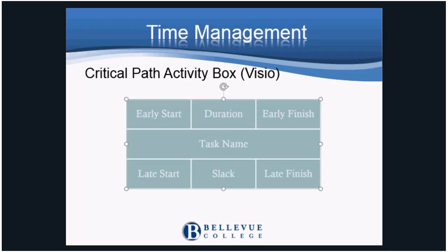Let me define these terms before starting the example. The early start is as soon as the job can be started. Usually a numbered day goes into the space. If the job before ended on day 3, then the earliest this could be started would be on day 4. Add the number of days in the duration to fill in the early finish.